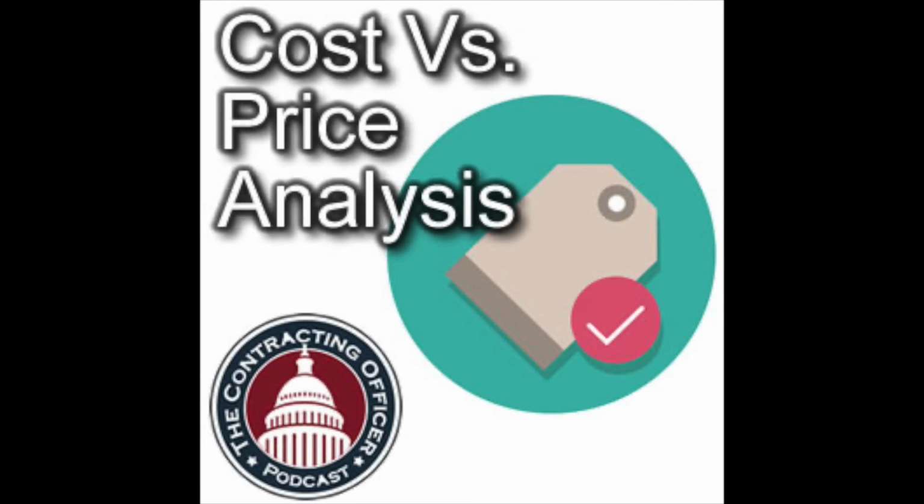Engineering change proposals, you're usually in a sole source type situation, so you don't have that, hey, there's competition kind of out on it. So a lot of times more data is required, but you can still rely on, hey, we just bought 20 of these. We want 10 more. Do we need to go through all the pricing for those 10, or can we just say, we just bought 20 and it was competitive? These are roughly the same price, must be fair and reasonable.